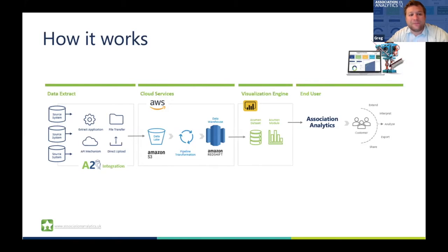When the data doesn't match up and it doesn't fit perfectly, we anticipate that we're going to run into those challenges through implementation. We anticipate that there's going to be dirty data. We anticipate that some of the systems may not be set up in the most optimal way. Oftentimes we go into these projects and customers tell us, this is how we do our grace period. And we look at the data and we say, that's not what the data is telling us. The data is telling us this. Where do we want to end up? So we've built in those sort of exceptions and variances into the project plan, anticipating that we're going to run into them, because everyone has little gremlins in their data somewhere. No one has perfect data. It doesn't exist, to be honest.